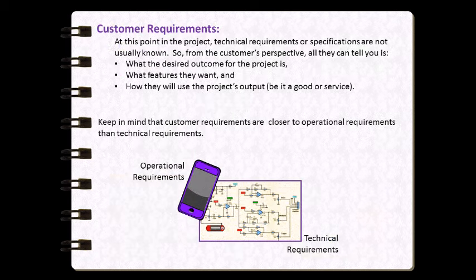The next section we are going to look at is customer requirements. Remember, customer requirements are produced very early on in the project's life cycle. At this point, the technical requirements or specifications are often not known. Most customers can articulate what they would like out of the project — what good or service they would like produced — but they are not always able to specify the steps that will be involved in producing that output. These steps are defined by the project manager and project team later on during the project planning phase. You can think of project requirements as being closer to the operational requirements that need to be fulfilled, as opposed to the technical requirements, specifications, or standards.